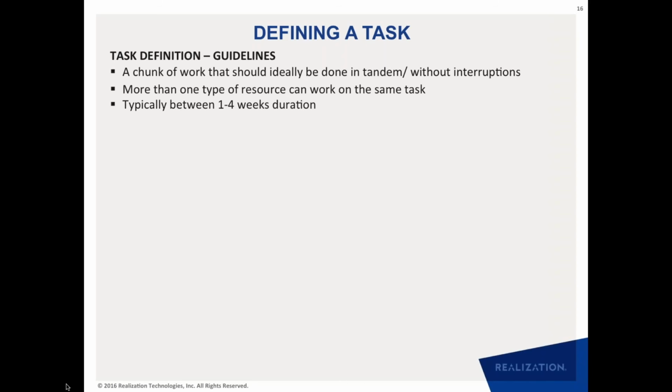In satellite product development, you have analysis that is related to the temperatures, or the thermal analysis. There's analysis regarding space. There's analysis regarding reflectivity. All those analyses, when they're happening on the front end, are being done by specialists from different departments. But the analysis that happens in one department affects the decisions that are made in the other department, which means all these different analyses need to be done in tandem.